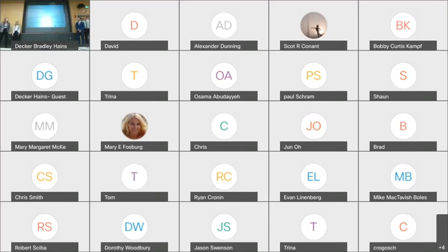For our public utility layout, we started with the storm layout, which is very similar to the private. And then the water, we created a loop in order to have connections with the tanks to the left. And the sanitary we placed on the east side of the road to create distance from the water. And the connections to the utilities will be made in the southwest corner. And currently, the utilities stop at the city limits, which are approximately 1 mile away from the site. So that would be factored into our cost estimates.